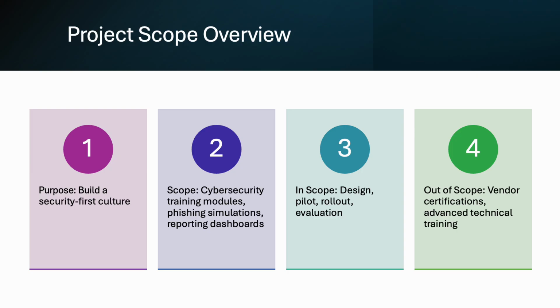Equally important is defining what falls outside of scope. The project will not include vendor-provided certifications such as CompTIA, Security Plus, or CISSP, nor will it provide advanced technical training for IT specialists. The intent is to focus on organization-wide awareness rather than specialized technical certification. By clearly stating this, we prevent misaligned expectations and keep resources directed towards the intended outcomes.